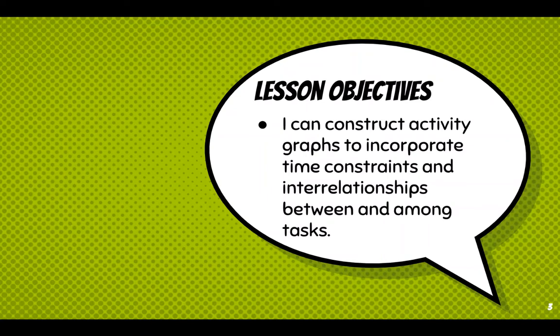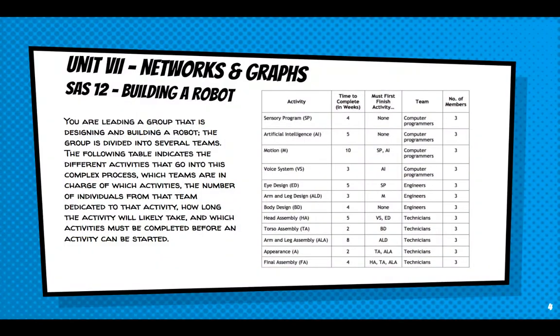So lesson objectives today, I can construct activity graphs to incorporate time constraints and interrelationships between and among tasks. All right. So building a robot. You see from this table here, you're going to lead a group that's going to design and build a robot. And we've got a few teams. We've got computer programmers, engineers, and technicians. The following table indicates the different activities that go into this complex process. Which teams are in charge of which activities? The number of individuals from that team dedicated to that activity? How long the activity will likely take? And which activities must be completed before an activity can be started? All right. Let's move on.